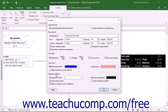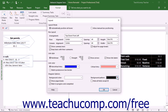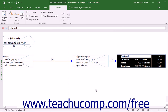The Diagram Options section lets you set the general appearance of the view. You can use the Background Color and Background Pattern drop-downs to select a color and pattern for the background of the diagram. You can then check or uncheck the checkboxes to apply or remove Show Page Breaks, Hide All Fields Except ID, and Mark In Progress and Completed. When finished using the Layout dialog box, click the OK button to apply the changes to the view.